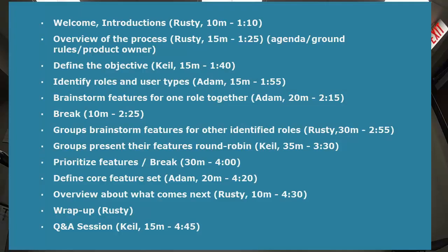Let's go over the agenda real quick for what we're going to do today. We just got through welcome introductions. Next, we'll do an overview of the process. The next step will be defining the objective, which is kind of like the vision for this project. We try and keep it to about a 25 word vision statement that describes why we're doing this project. What is it? Why are we doing it? And then we'll talk about who wants to use this website? Who are all the different types of users who would come to this website from attendees to sponsors to whoever that would be. We'll try and brainstorm all those types of users and we'll do it up here on the board. And then we'll start thinking about, for each of these types of users we talked about, what are they looking for? And why are they looking for it? What do they really need? And why do they need it?